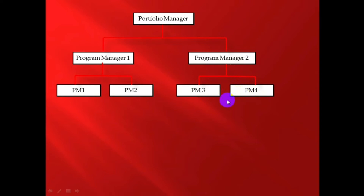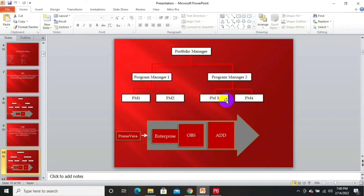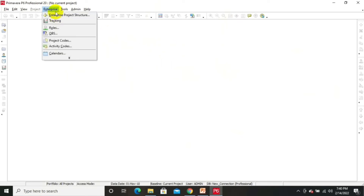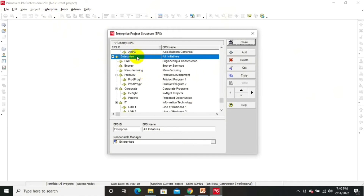Now let's have a look at EPS and OBS in the Primavera software. Everything is closed here. To define EPS, we will go to Enterprise and click on Enterprise Project Structure. There will be a built-in EPS in Primavera when you first install it.